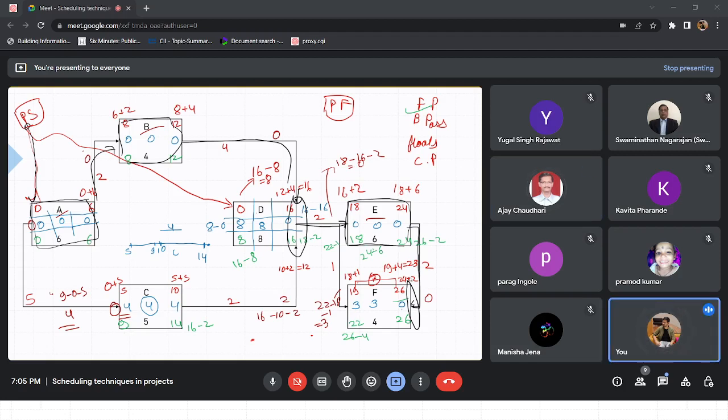Actually, the critical path has to follow some lines. I mean, it has to go through some connecting points. What happens is that when we talk about interruptible activities, we are actually looking at three parts in one activity: the start of the activity, the end of the activity, and its execution.